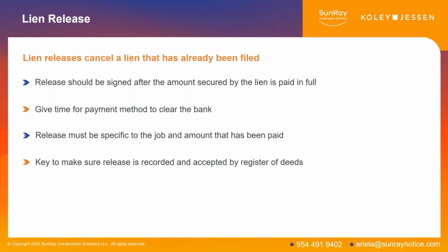And our final piece of advice on lien releases is, in our experience, the Register of Deeds offices in the various counties across the state of Nebraska can be very particular about different details when a document is recorded. So it's very important that you understand the details of the release, the formatting details, the signatures are legible, the sizing is correct, because if you record it with the Register of Deeds and something isn't quite right, they're likely going to reject that and say you need to refile it.